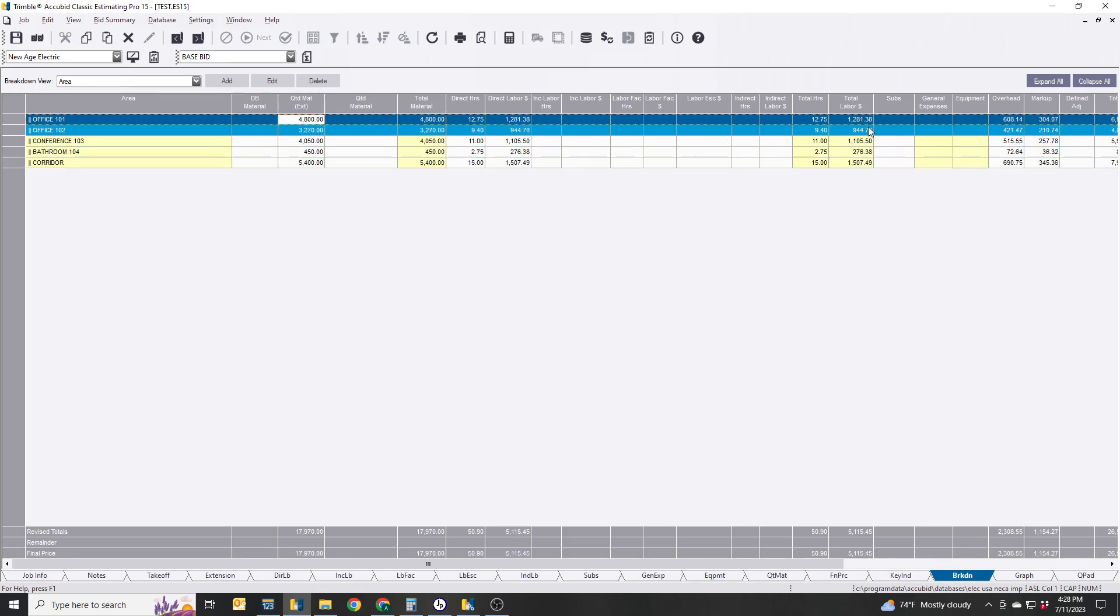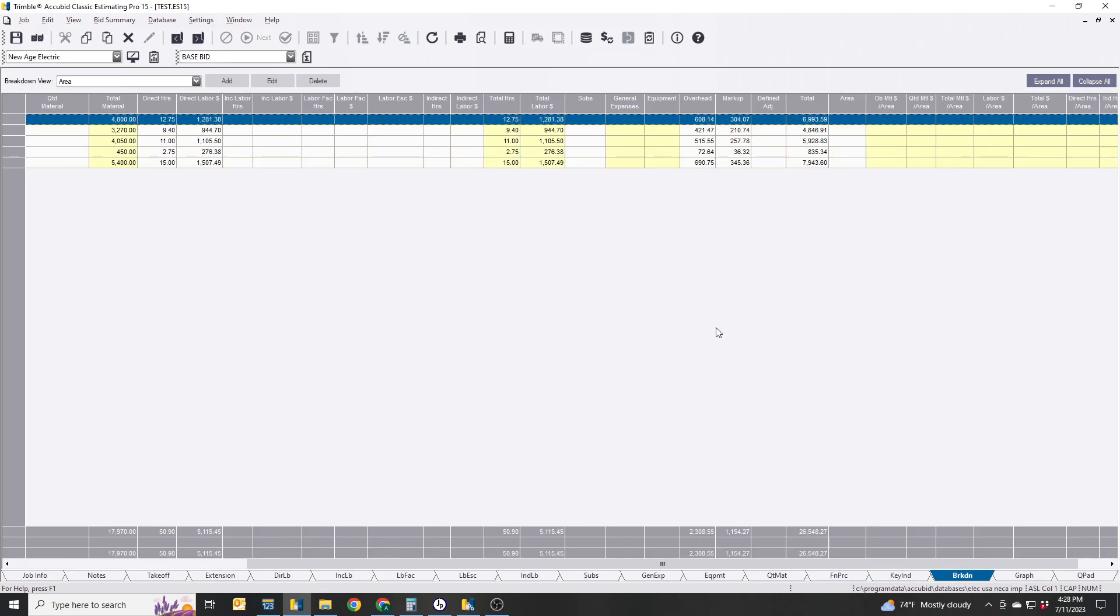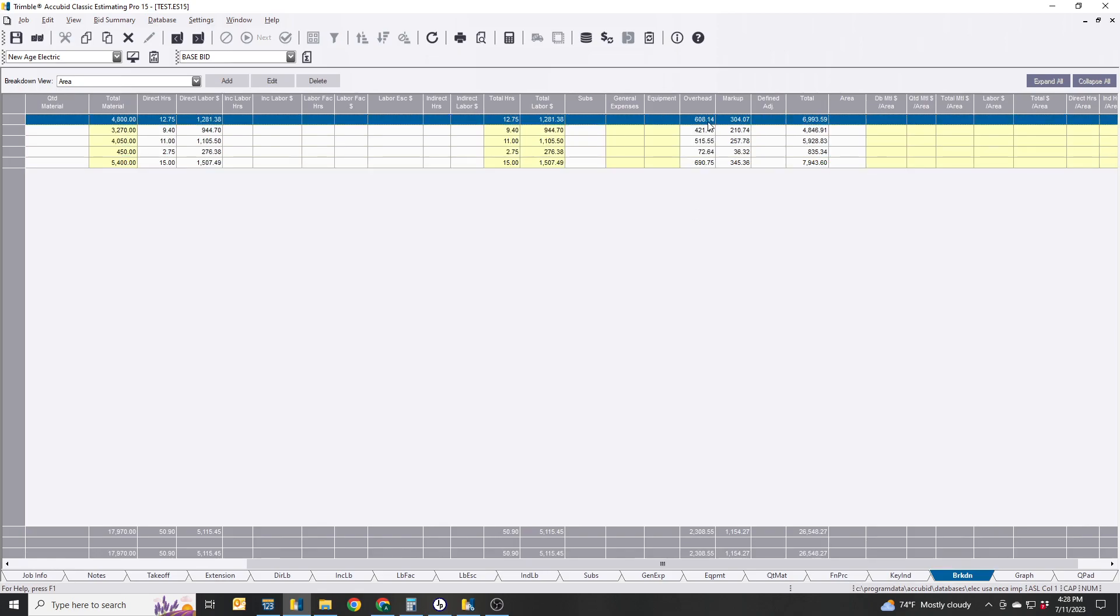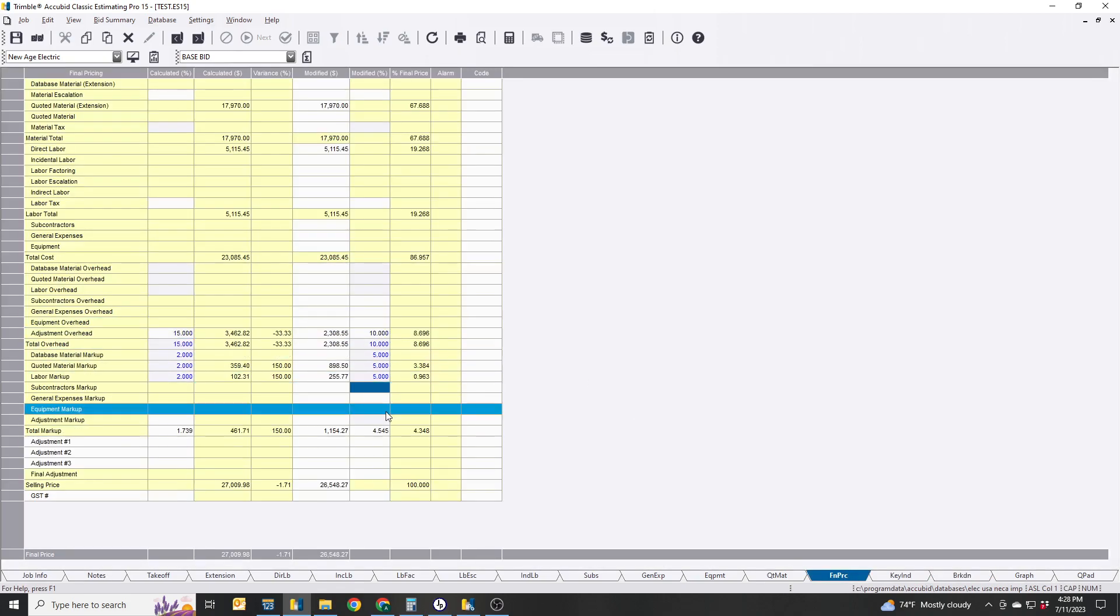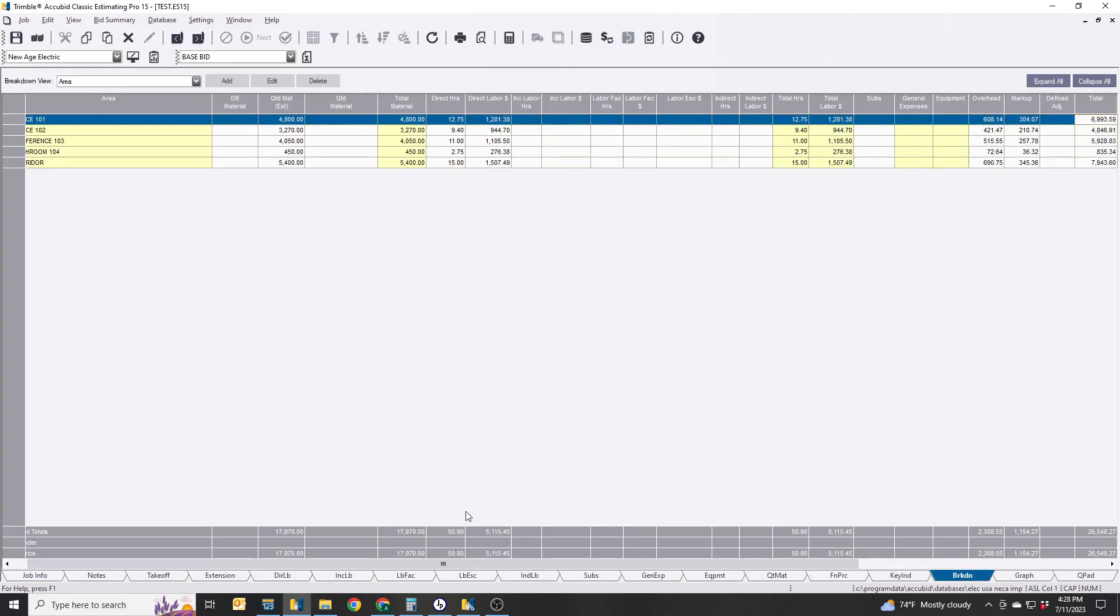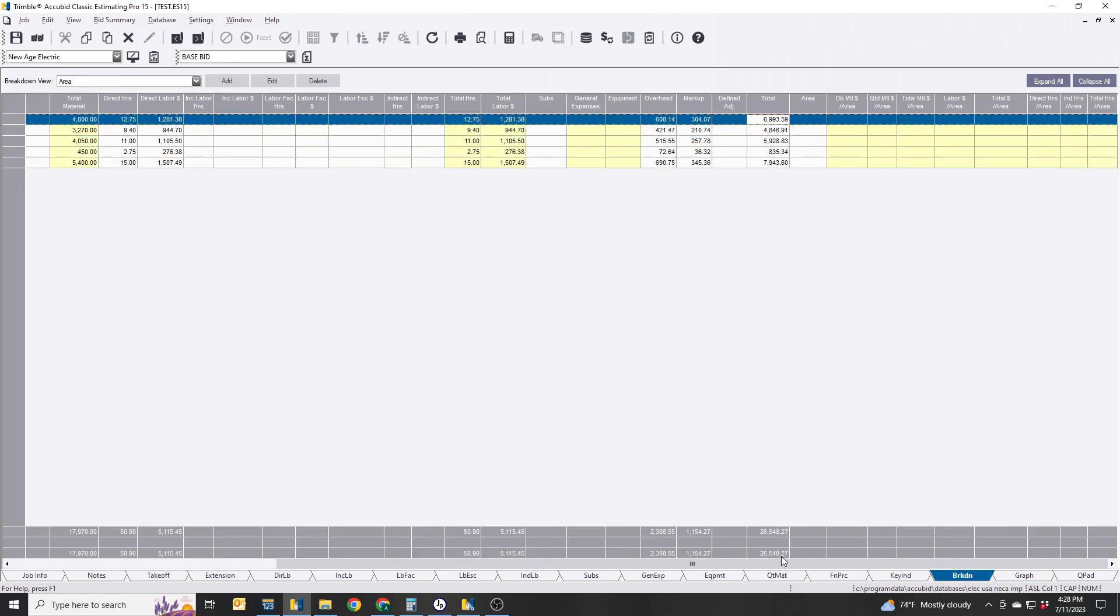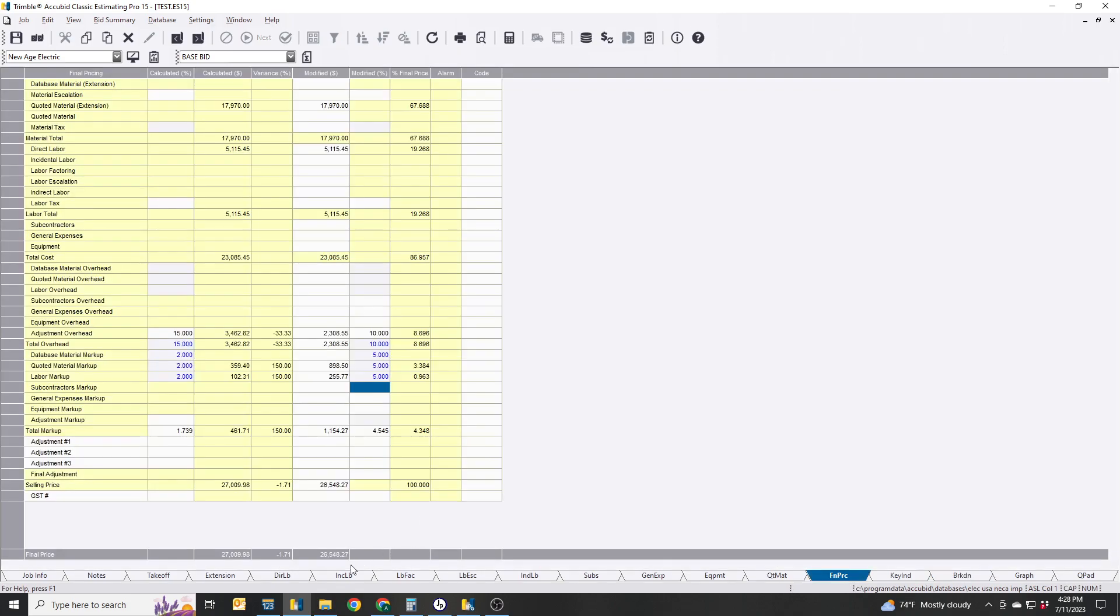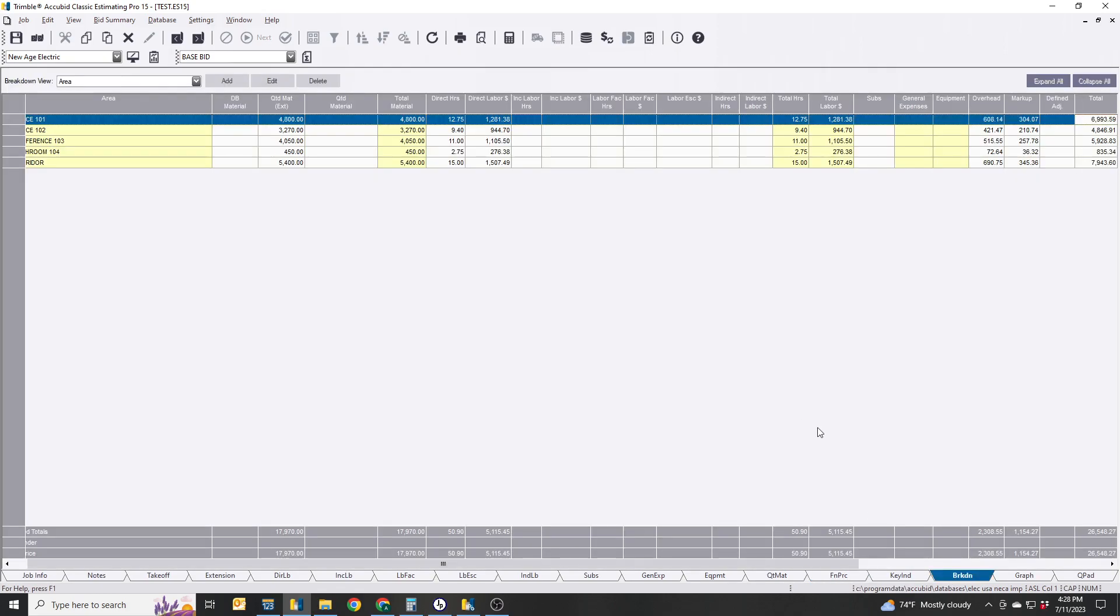Everything is basically broken out right here. Gives you labor, total hours, and your overhead and your markup. But just keep in mind that this overall markup you got right here is basically dividing it amongst all of these, so you'll come up with the same exact price, the $26,548.